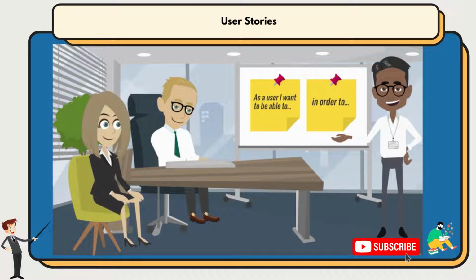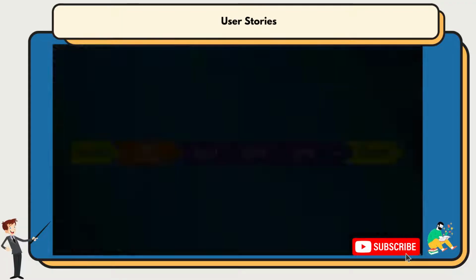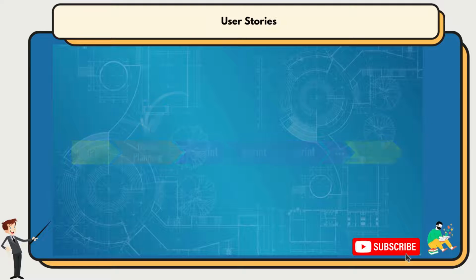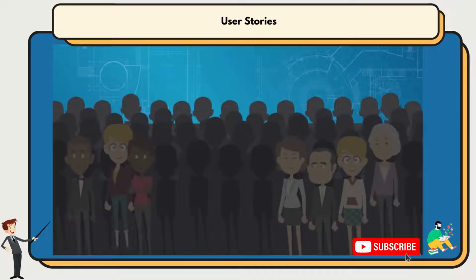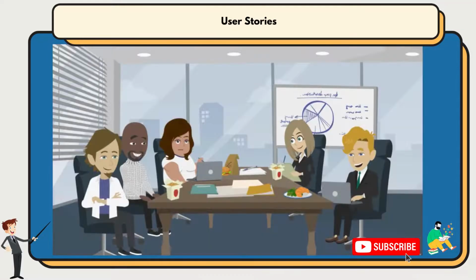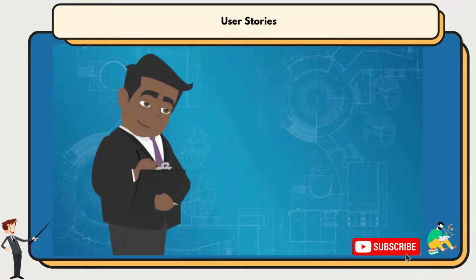User stories seem really useful indeed. Let's see how they're created in the first place. The process of gathering, discussing, and documenting them begins during the initial planning activities. It can happen in different ways. For example, the future users, or if the group is too big, e.g. consumers in a given market, representatives of these users are invited to workshop sessions, where they brainstorm together and generate the user stories. Another possible scenario is having user stories provided by the so-called product owner.